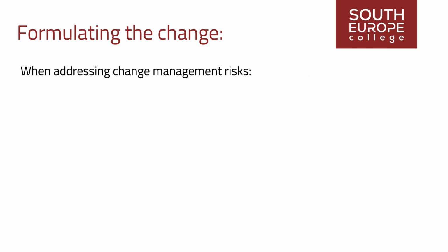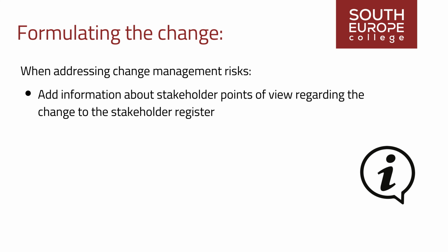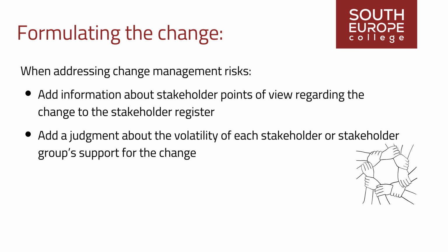When addressing change management risks, it is useful to add information about stakeholder points of view regarding the change to the stakeholder register, and judgment about the volatility of each stakeholder or stakeholder group's support for the change. What could alter a stakeholder's support for a change and its outcomes?